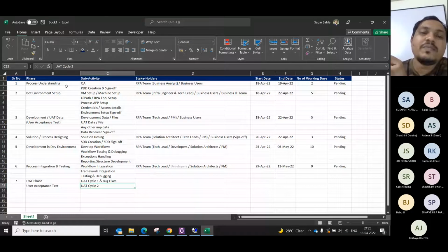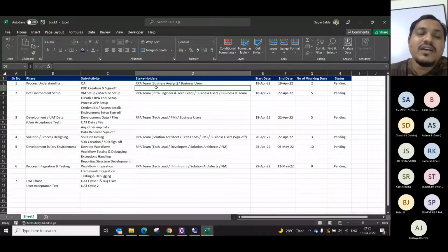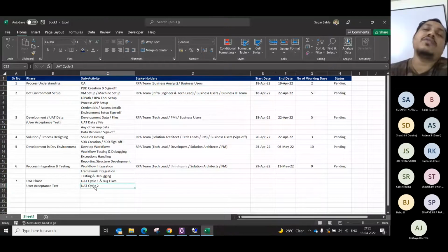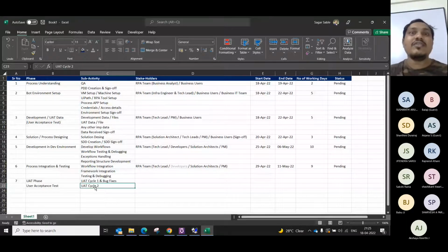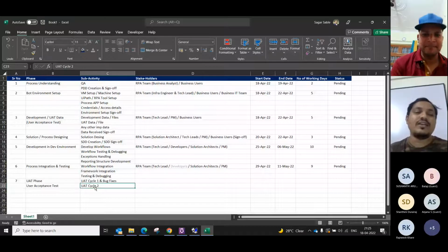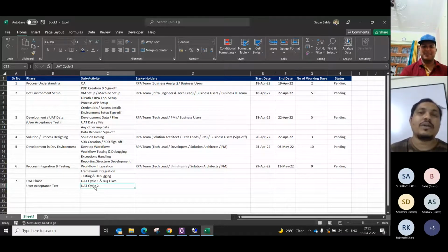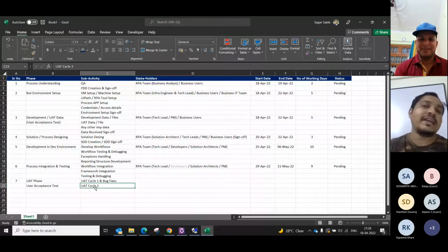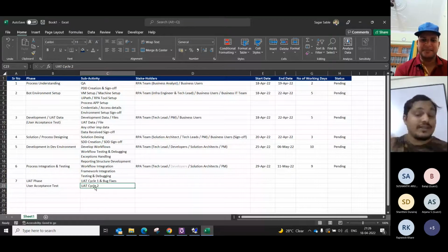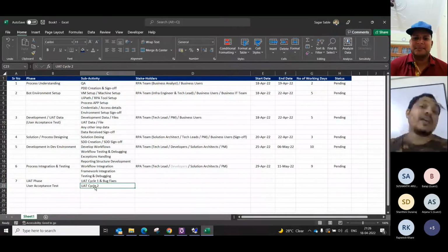So generally what happens, your business analysts do not get all the information, and then when the UAT is happening, your business users will say, oh my god, you have not developed this, this is not happening, you have not worked on this, we don't accept this, do the changes. Again you have to start developing the design, again you start the actual development, again you start integration. So this is a long process. So if you want to have the right implementation plan and execute it correctly, you need to start right, you need to understand all the parts correctly first of all.